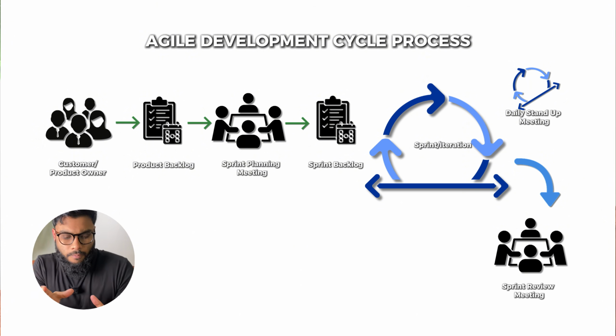Now, this is where you're going to have your team and the client involved, and you're going to present what has been created in the sprint to the client. This is the time where the client can say, you know what? Instead of 12 cameras, I want 20, right? That doesn't mean they're going to get 20 cameras. Rather, the suggestions are going to be added in a prioritized fashion in the backlog.